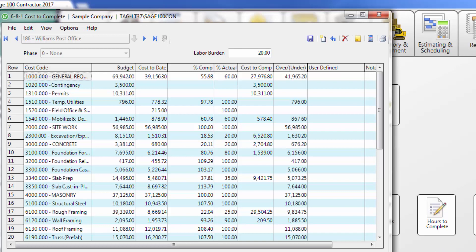Sage 100 Contractor will also include unposted payroll in the cost-to-date calculation, so enter in a labor burden percentage if you would like that to be included as well. Now you have two options. You can either enter a percentage complete by cost code, or you can enter the total cost to complete by cost code. No matter which option you choose, the software will calculate the other option for you automatically.